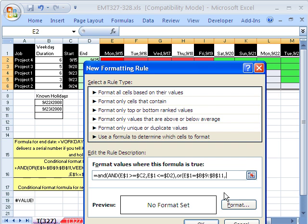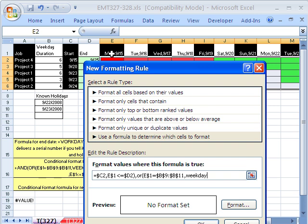Now what's nice about the or function is it can handle that. If three cells in this range are set equal to a single cell, it'll deliver a true or false for three cells. Any one of them come out and the or will say, OK, for that conditional test it's a true. Now we need to figure out something that will ask this date right here, Are you a Saturday or Sunday? And we're going to use weekday because weekday can deliver a 1 for Monday, a 2 for Tuesday, all the way to a 7 for Sunday. And what we're looking for is 6 or 7. So I'm going to do weekday, open parentheses. I have to click on that same cell and lock it only in front of the row reference, comma, 2.